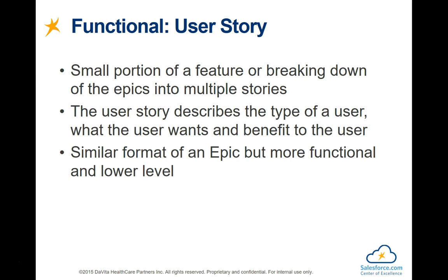There is a specific format that we use for user stories, and it covers the type of the user, what that user wants, so that's an outcome, and then the potential benefit to the user or to the business unit if that function is performed.